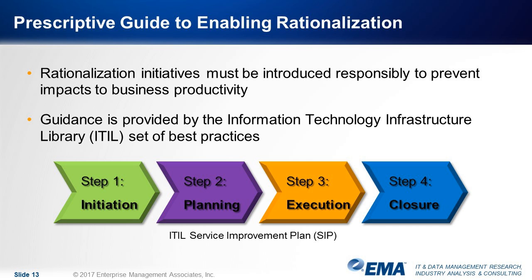And a key precept of these recommendations is that services should be introduced systematically rather than all at once. And for each transition activity, sufficient time should be provided to ensure services successfully settle in and any unexpected problems are resolved before moving to additional transition steps.